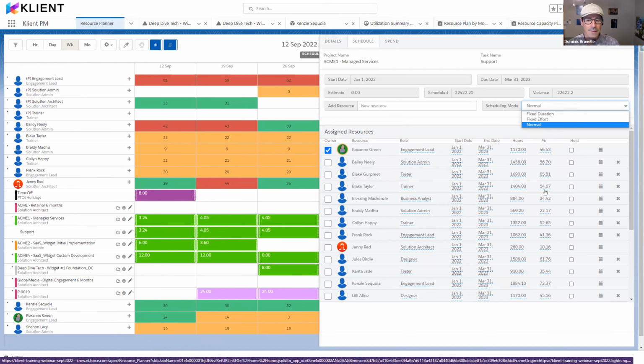So let's say you have 40 hours, you put one person available 100%, that's going to take a week. But if you put one person at 50%, then the task length would be stretched to 2 weeks. So it's not exactly the question you're asking, but that's one concept of having the assignments not necessarily spreading across a whole duration.